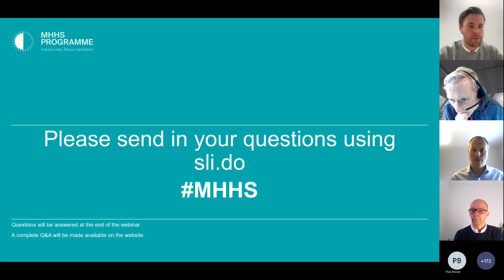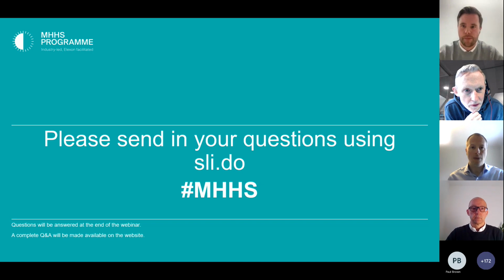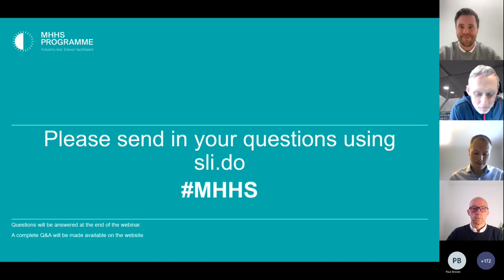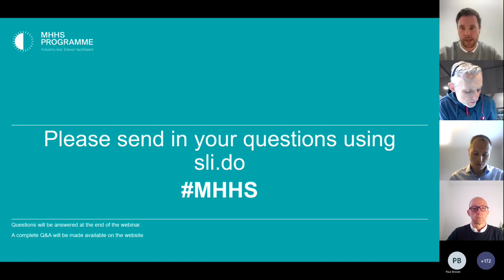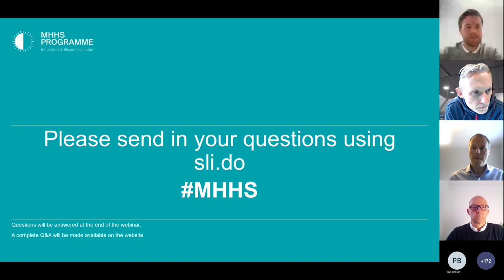Excellent, thank you, Richard. Will a change request be raised for the changes to the interface specs? I think this touched on what you mentioned earlier, Richard, in terms of any changes will adhere to the governance arrangements that are already in place. Is that correct? That's right, yes. So I can answer yes. We'll have to raise change requests for the changes to the interfaces that are needed. Excellent. And all details of our design change control and further change control processes, we'll link that as well. Yeah, they will go through the Paul's design forum.